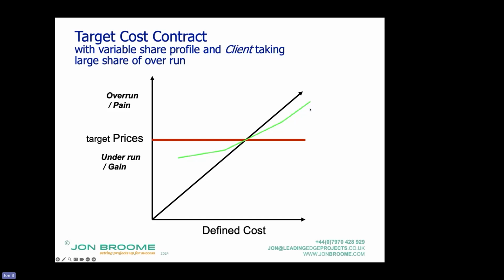All right. So go back to the insurance effect. We're the insurers, right? Now, if it absolutely followed this line here, parallel, effectively it would have become a cost plus contract. In this one, at plus 20%, the contractor loses their margin, their fee percentage. So any contribution to head office overheads and profit has disappeared.